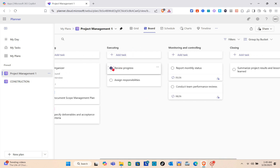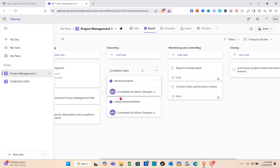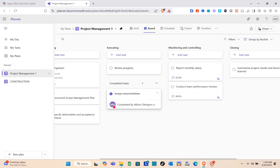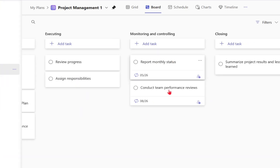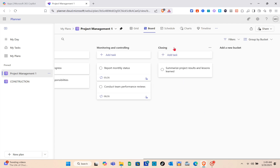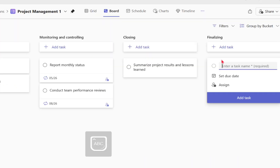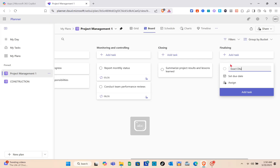Next is the Executing bucket. When a task is done, click the circle to complete it — clicking the arrow lets you see finished tasks. We also have Monitoring and Controlling with a 'Report Monthly Status' task, and a Closing bucket. To add a new bucket, click 'Add New Bucket' at the end of the sections, name it, and add tasks and a checklist.